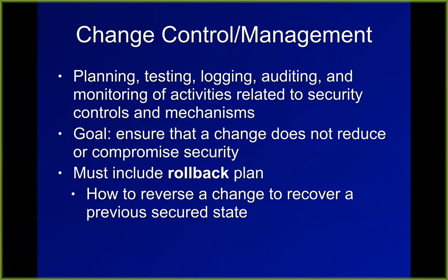Once you've got your infrastructure in place, you don't let people just change it casually anymore. If someone wants to change something, they have to justify the change and get authorization first. And they also have to have a rollback plan.